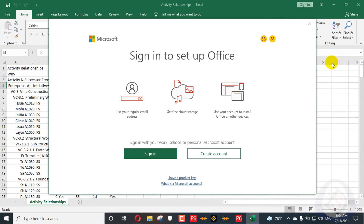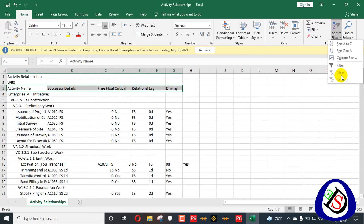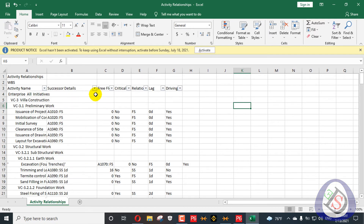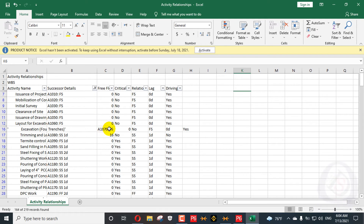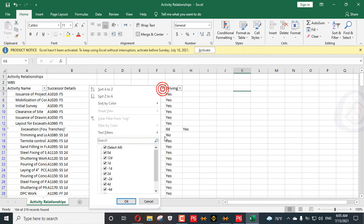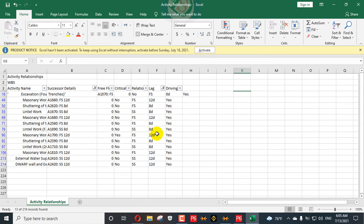Now how to find out the lag in your project — what should be the minimum lag? We apply a filter here. We can see a lot of activities. Remove the blanks so all activities are shown. To find out the lag, filter out the zero lag, and you will see: zero, one, minus one, minus two, minus four. Minus values are leads and plus values are lags.